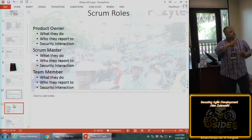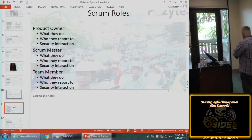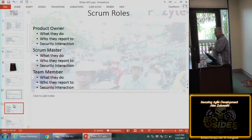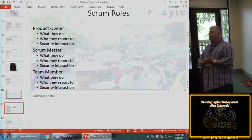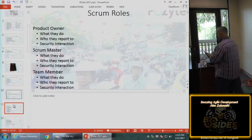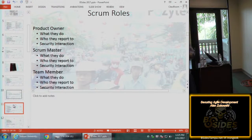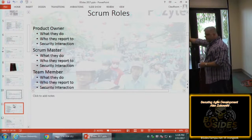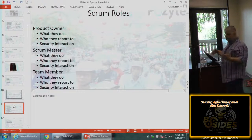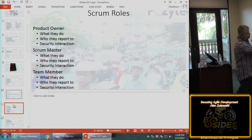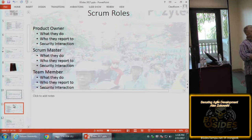The Scrum Master is the gatekeeper. They're responsible for the daily stand-ups — 15 minutes every day. They ensure that if the team is being blocked by any problems — VMs not set up on time, someone giving them a hard time — the Scrum Master handles it: 'You, team member, go back to developing — I will fix this for you.' They also keep the burndown charts, Kanban charts, and tracking mechanisms up to date. They're a general cheerleader.